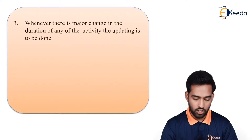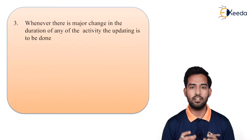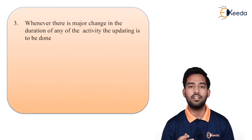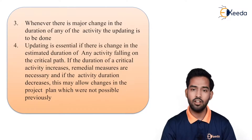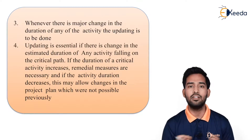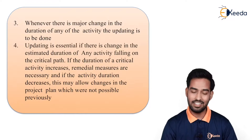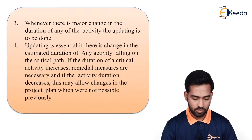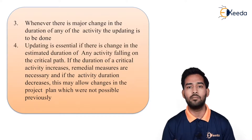Whenever there is a major change in the duration of any activity, updating must be done. If any event can be done at a particular time or will require more time and there is a large duration gap, we have to go for updating. Updating is essential if there is a change in the estimated duration of any activity falling on the critical path — this is a must. As we know, the critical path cannot be disturbed. If a critical activity is getting delayed, we have to go for updating. If the deviation of the critical activity increases, then remedial measures are necessary. And if the activity duration decreases, this may allow changes in the project plan which were not possible previously.